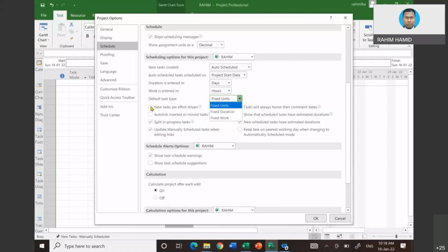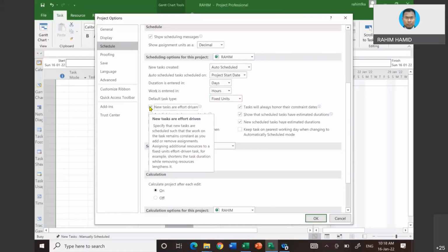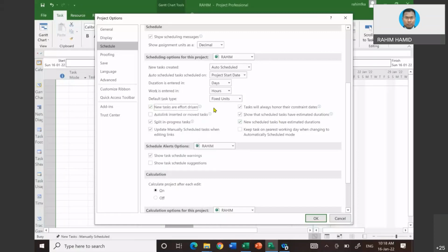You need to click on this button as well. We already learned this in project labor resource management. As I mentioned, there are two ways people normally do the scheduling: time-driven or resource-driven. If you can still remember, you can refer to my slide. Time-driven means we fix the timing first, and then we figure out the right resources to fit our timing.